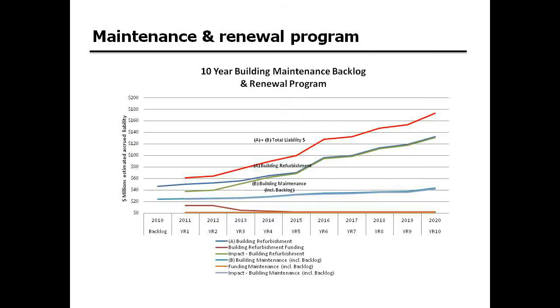So after we've considered and reconciled all the building audit data, if we look at it from a strategic point of view, looking in, and couple it then with the data from previous topics, which is life cycling, we can consider that the building audit data will give us a line in the sand, what the building represents today in liabilities and defects and deficiencies. So we can apply dollar value to that, as we've done here in the graph.